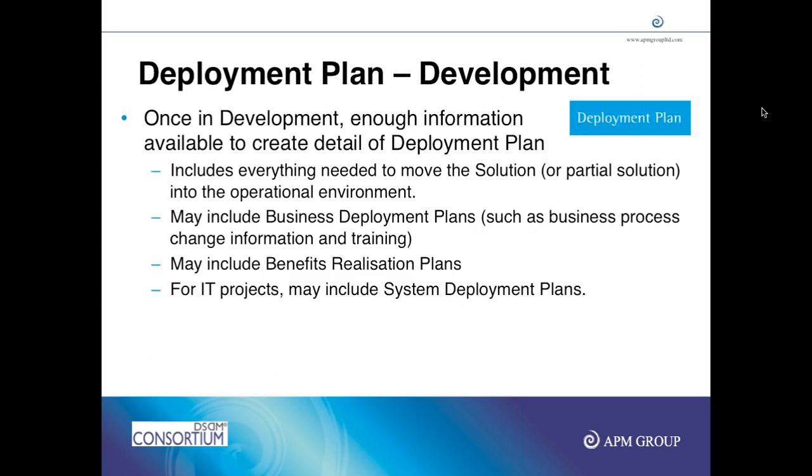We have another plan called the deployment plan, which is basically done as part of exploration and engineering. In fact, as part of engineering, and the deployment plan is prepared by the solution development team. It tells the solution development team how to release the software in the production environment, or how to ship the product. It talks about the various steps required, like installation scripts to be run, their order, backup, restore, validation. It also talks about training, documentation, training to people, knowledge transition to support people, and what changes have been made in the design. All of that is part of your deployment plan.